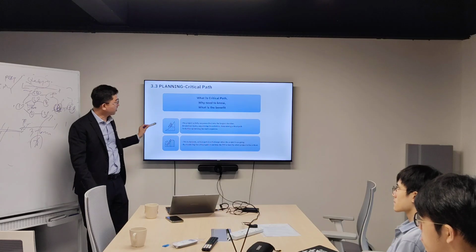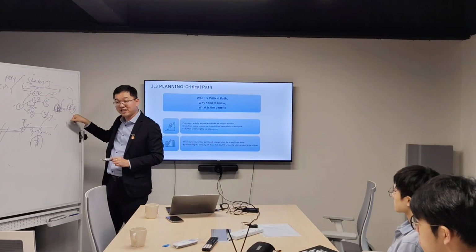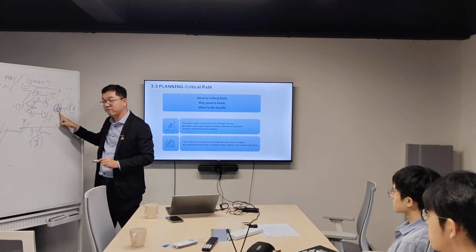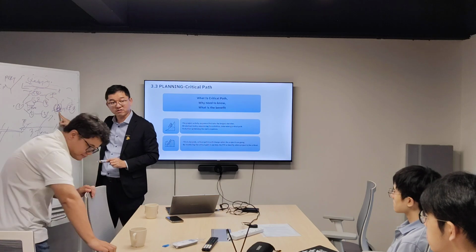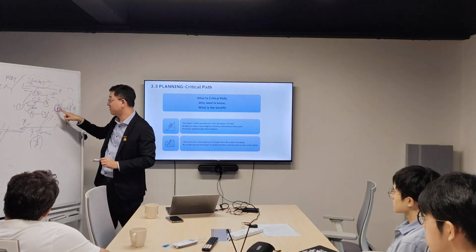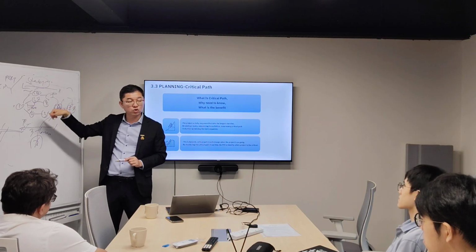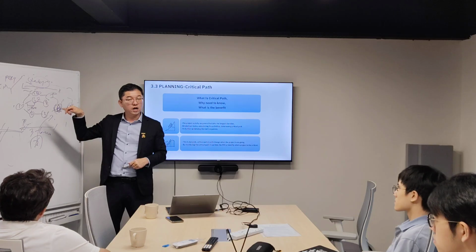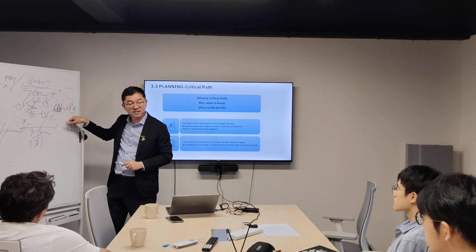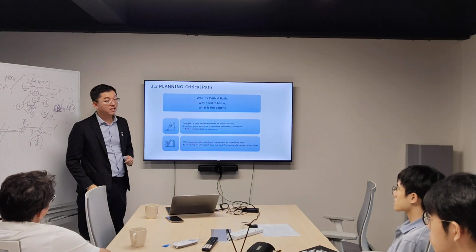So this is the critical path, in order for you to proceed to activity 7. You need to achieve activity 6 completion first, right? From activity 1 to activity 6, this is the longest time frame that you need to use in order to proceed with activity 7. That is what we name the critical path.